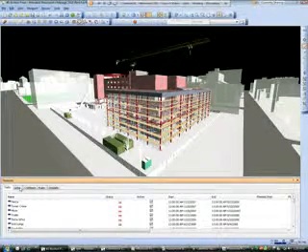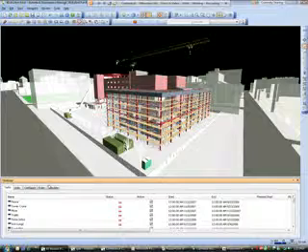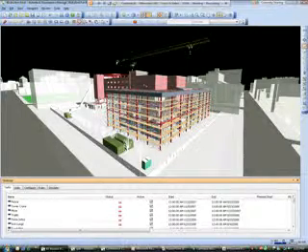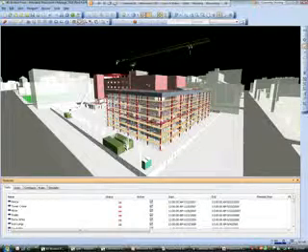Some of it goes back to entitlement issues, but a lot of times the project schedules that they're sharing with owners are kept relatively simple. They may have an internal schedule which has a little more detail to it that's used only within the organization, not necessarily shared with the owner. So in this case, I'm able to link in multiple schedules. I have the standard project schedule, which is representing the beam work, the MEP, the architectural envelope, but then I also have a separate schedule which is referencing some of the equipment here on site.